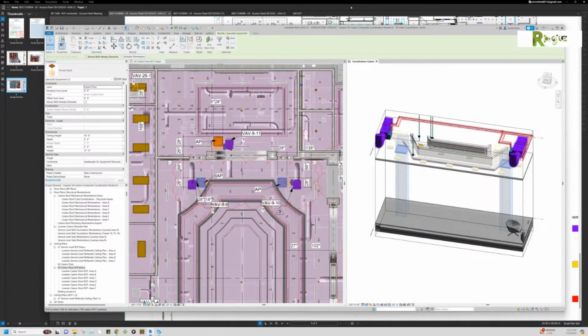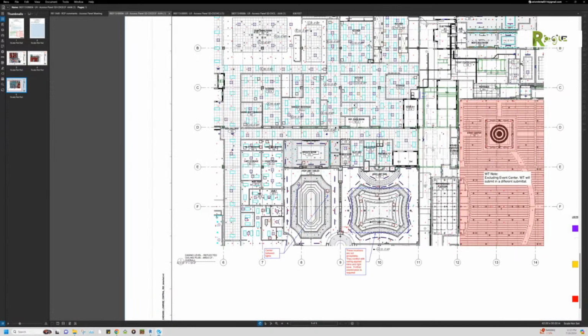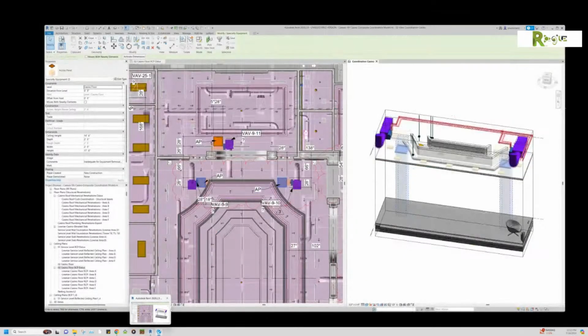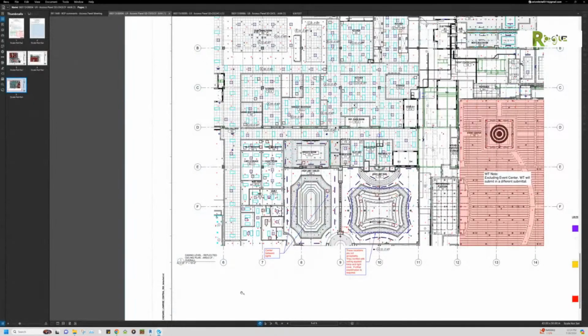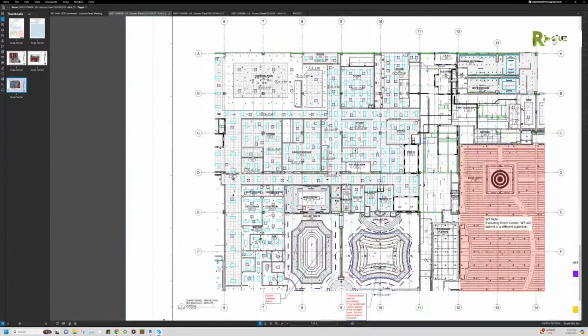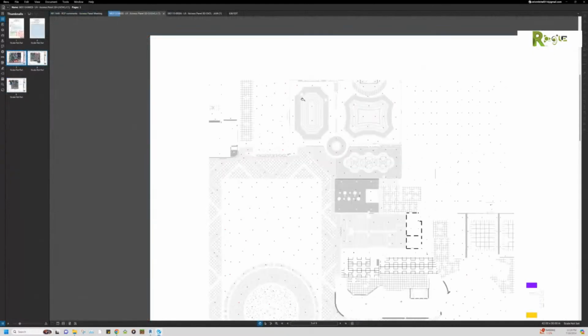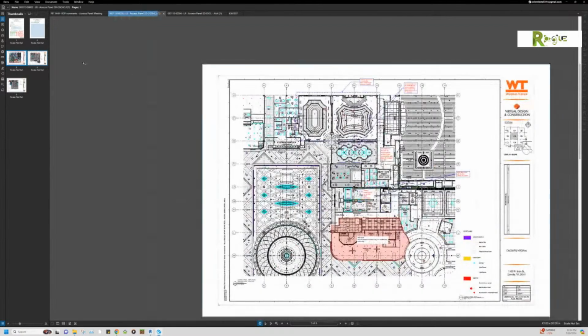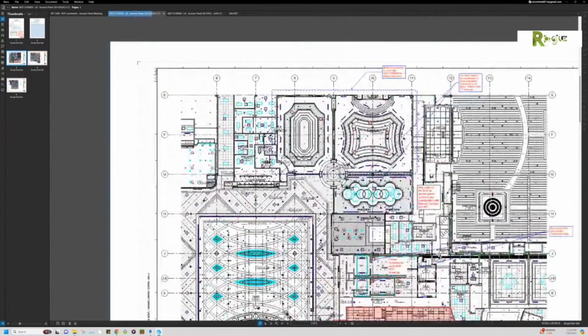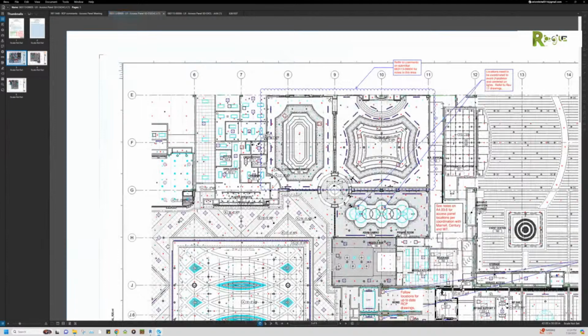Well, ironically, that's why they wanted those boxes to go to the bottom, so that they could see if there was any equipment below there. But what do you see missing from the model? Any of the equipment. Yeah. Right? You should really have all of that stuff built. You mean the gambling tables and such? Yep. See, so if there was any permanent equipment there, then you could see, oh, this is not a good spot for an access panel. Now they'll have to move all the slot machines in order to get to that access panel. Yeah. But they never really followed up with it because no one built the permanent equipment.